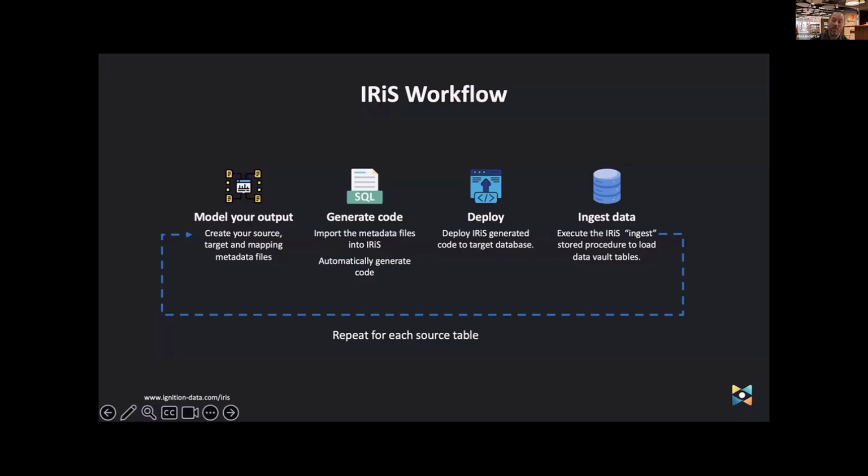Your Scrum Master or project manager knows that we want to deliver value quickly and get this output out to the business quickly. That requires us to look at these two or three source tables. Each source table, like this one, will build you a hub and a satellite. You know that it takes, let's go with round numbers, a day to produce your code, test it properly, and make sure everything looks right. What you've got is a way to estimate a task on your board, and that allows you to sprint plan really easily, or much more efficiently.